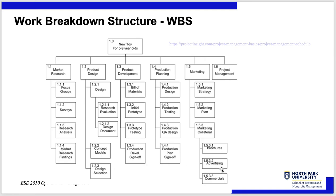Imagine if you're doing a nuclear submarine or an aircraft carrier — every one of the first-level breakdown items is like a separate project. You could decide it's a program. Then you have basic building blocks, and then you start getting into detailed activities. A work breakdown structure chart for something like that could fill up the wall of a very large room.